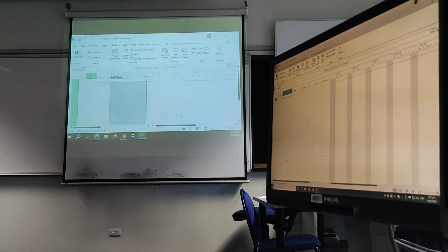We're going to break those big bits down. But the important thing is, you break it down into big bits, you look at those big bits and say, do they cover the whole scope of the project? And when you can say yes, that those 3 or 4 big bits, level 2 tasks, that they cover the full scope of the project, then and only then you start breaking down each one of them.